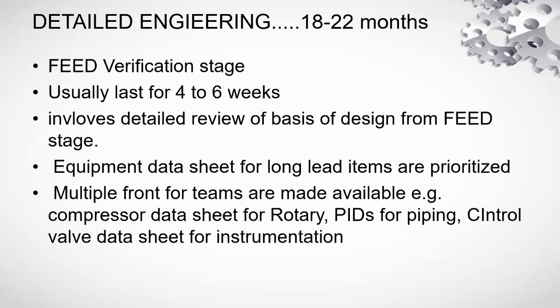So these aspects are kept open and pushed to the detail engineering stage, wherein any change in these aspects might impact the overall cost considered by the engineering contractors or construction companies. So in the FEED verification stage, it is expected from the detail engineering company to find out open points like this one, as I mentioned.